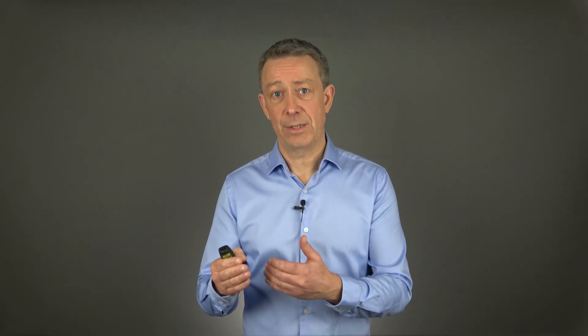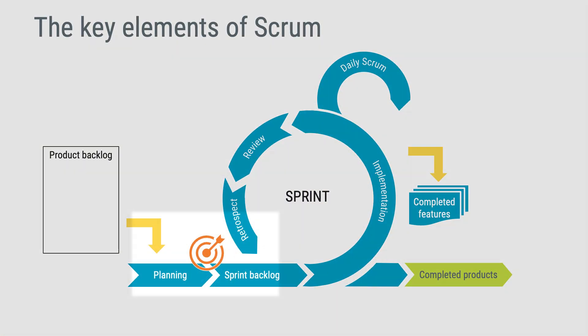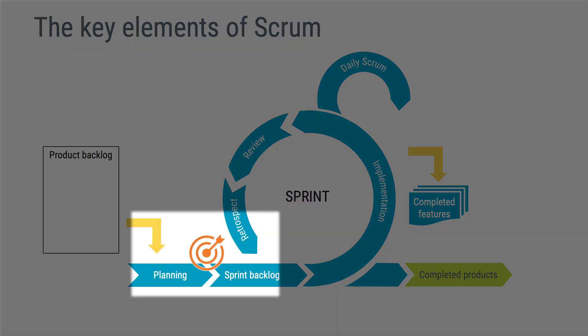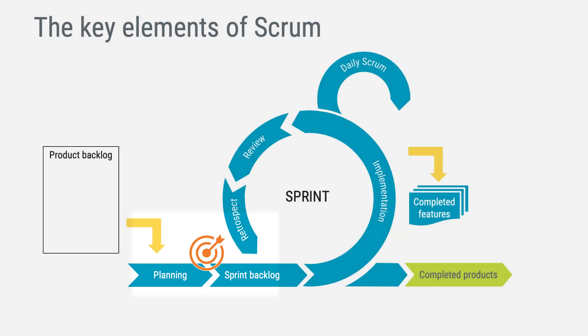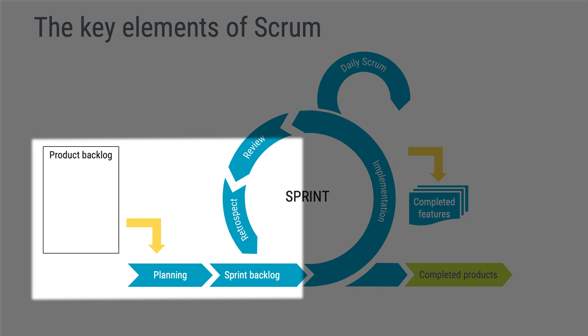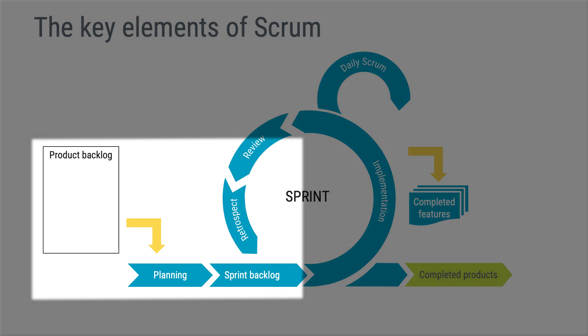For instance, before a new sprint is started, the development team agrees on a sprint goal and plans the work that will be carried out. Once the sprint starts, the sprint goal is the focus and changes should be deferred to the next sprint. Before a sprint can begin, three key components must be in place: the product backlog, the sprint backlog, and sprint planning.